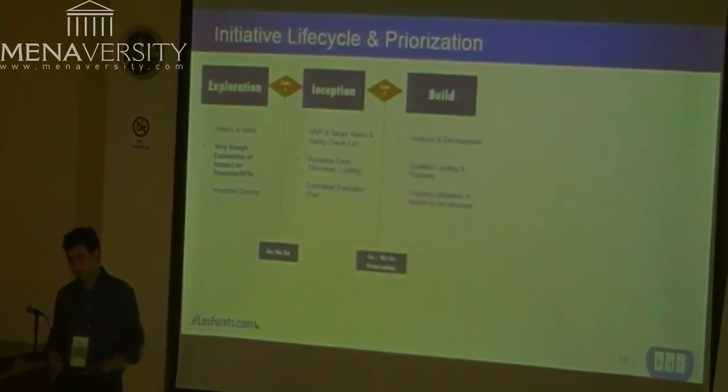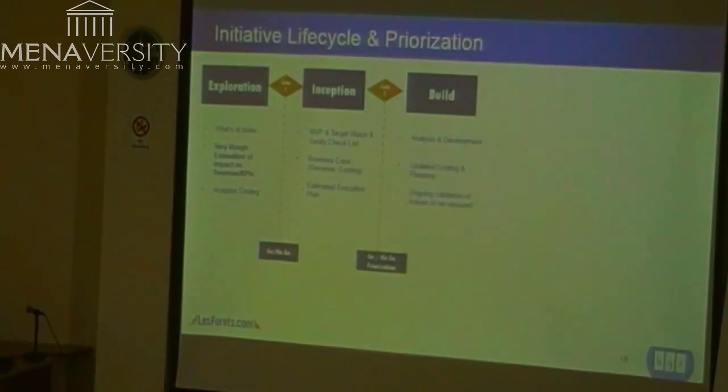I put analysis and development here at the same time on purpose, because somebody was asking the question. We do not split it, okay, guys, work on analysis, come back a few weeks later, talk to the devs. They all work at the same time. So if we are autonomous on developing some parts of the product before analysis is finished, we're going to do it. We put them in the same teams and they work on this.